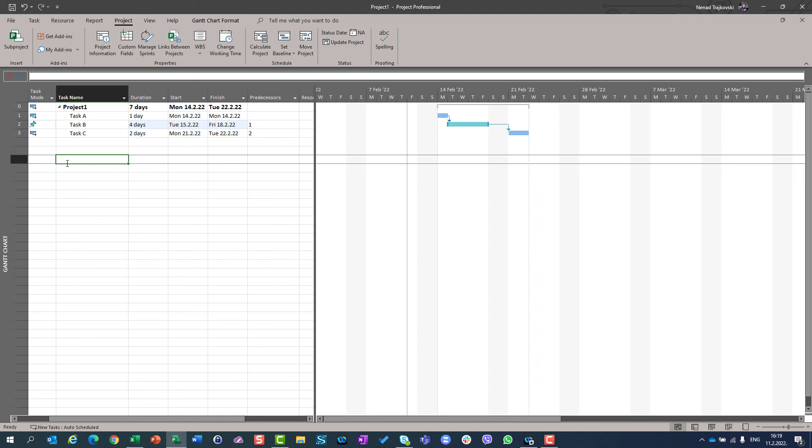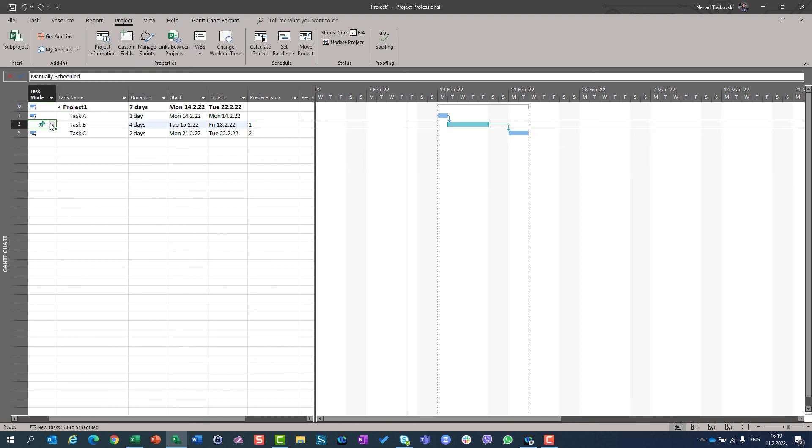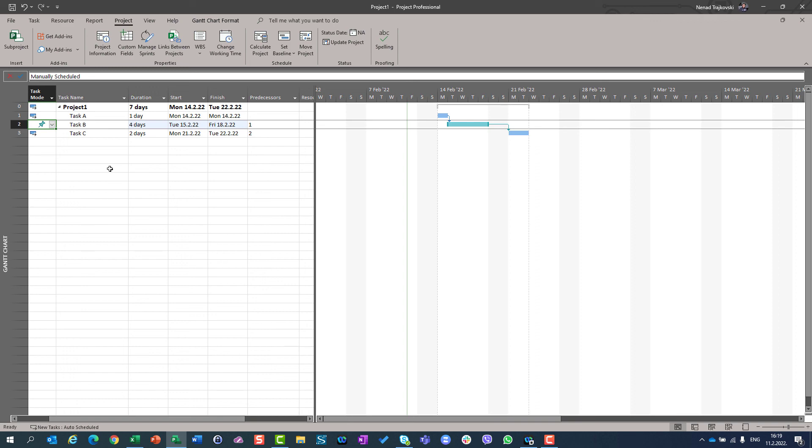should do that is at the end of the planning phase. And basically, with that said, you are letting Microsoft Project to take care about your tasks. But at the very early planning phase, when you are not aware about some data, then manually scheduled mode is a great thing to use. I hope this helped. Thank you very much.